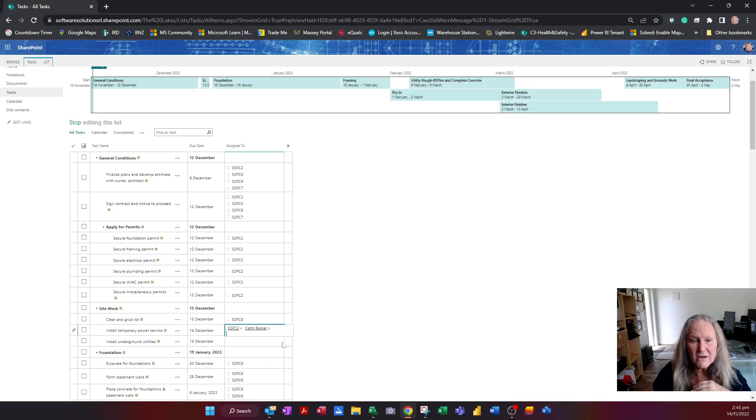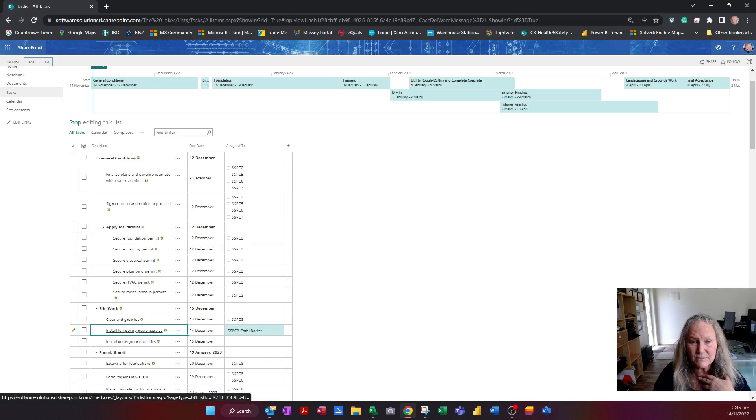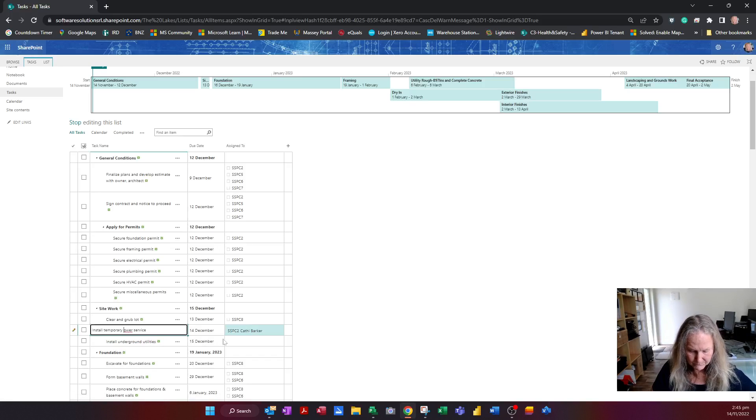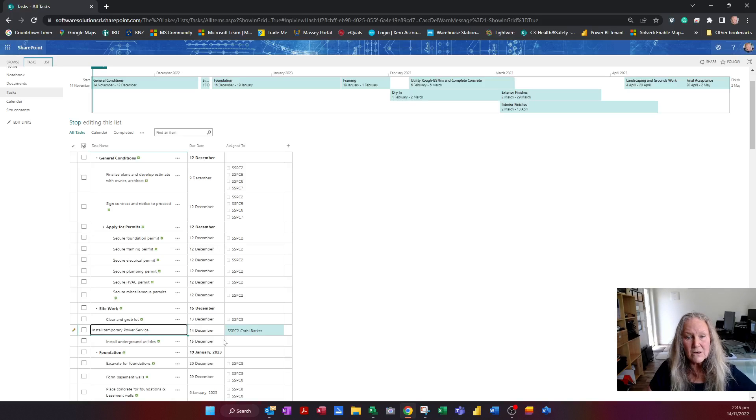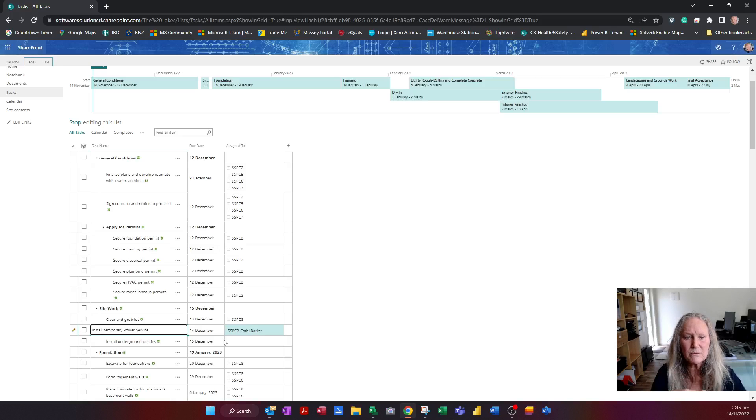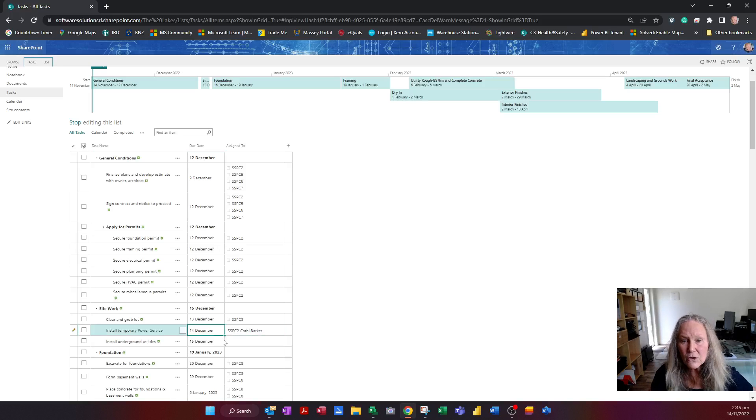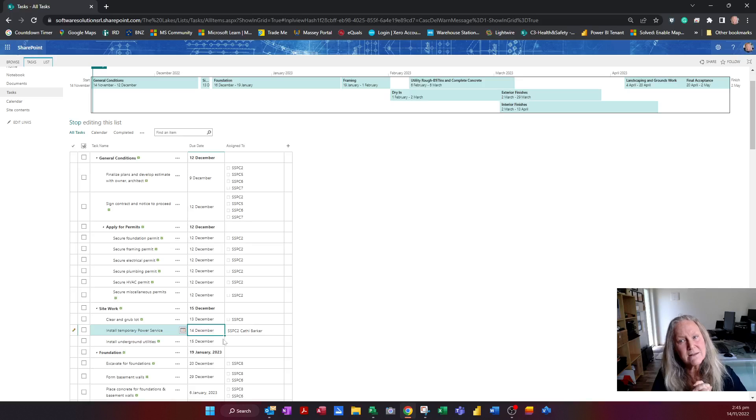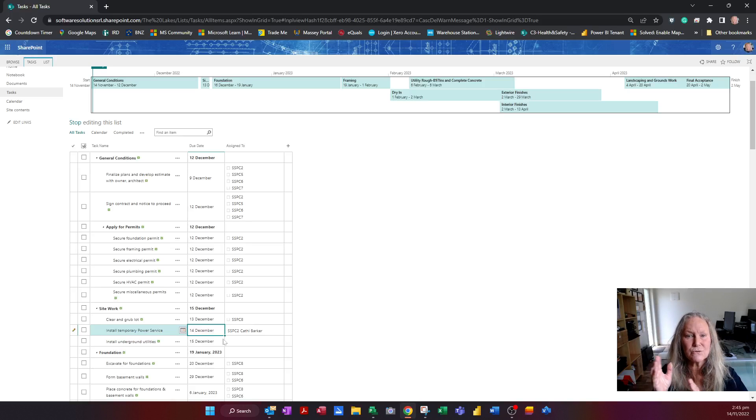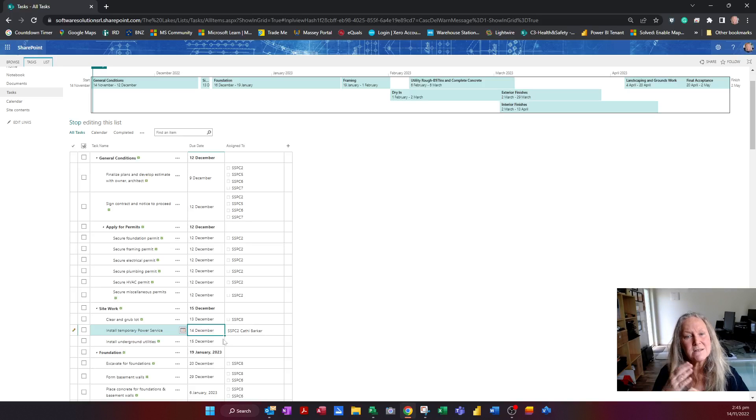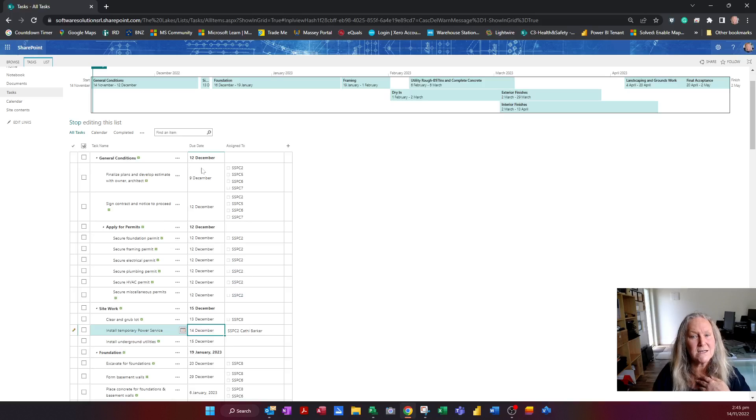If I need to edit anything, I can simply click on a particular task and just simply start editing it. So you don't need to buy Project for every member of the staff who are working on a certain project. You just simply make it that project is published to or synced with SharePoint and use your SharePoint licenses to get people to update and edit tasks.